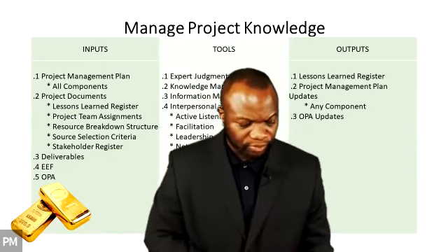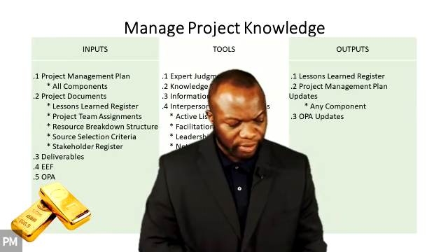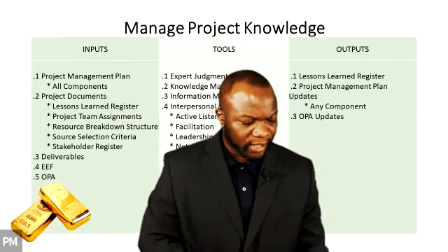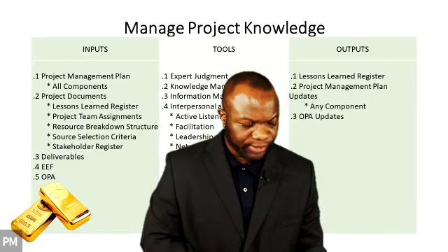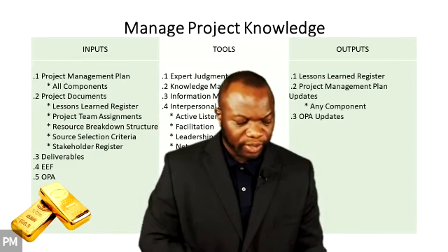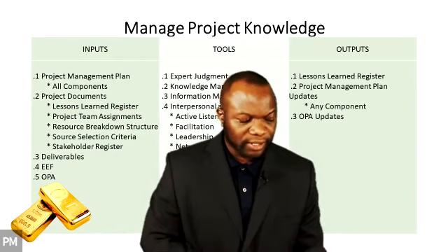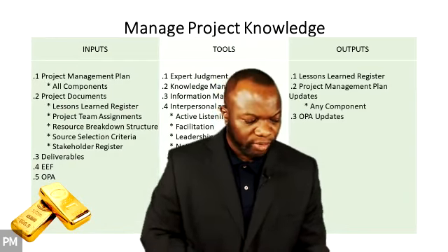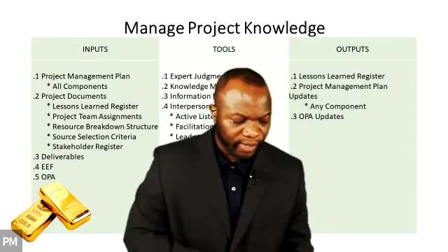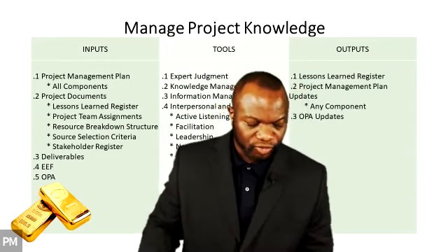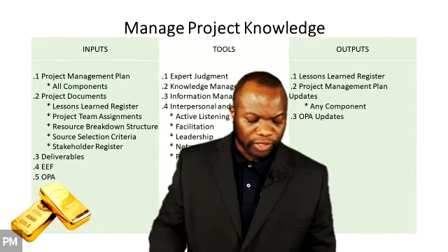COPs, communities of practice and subject matter experts, for example, may generate insights that lead to improved control processes. Having an internal sponsor that can ensure improvements are implemented. It says lessons learned register entries may be analyzed to identify common issues that can be addressed by changes to project procedures.